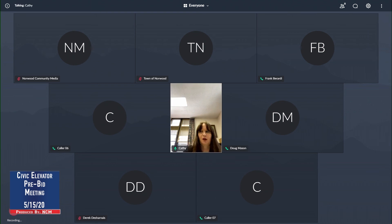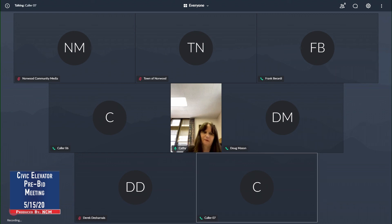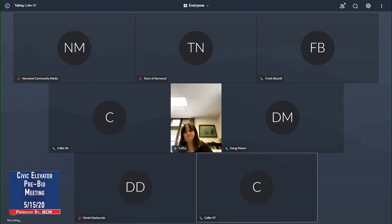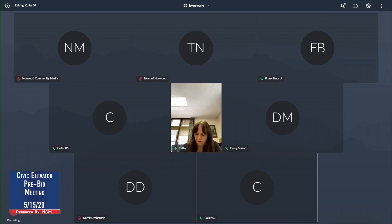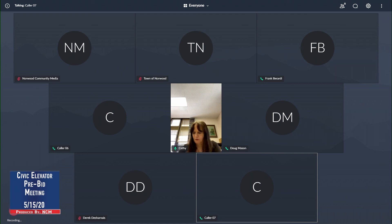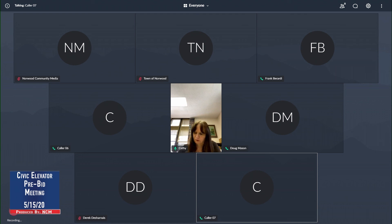Any other questions? Travis, the recreation director. Thank you for hitting on the elections as well. But September in a traditional year, but like you said, nobody really knows, we will see a lot more foot traffic in the building, too. So, September, October, in addition to the elections, you'll see a lot more foot traffic as well. There is a window in July and August and maybe early September to try to get some things done.